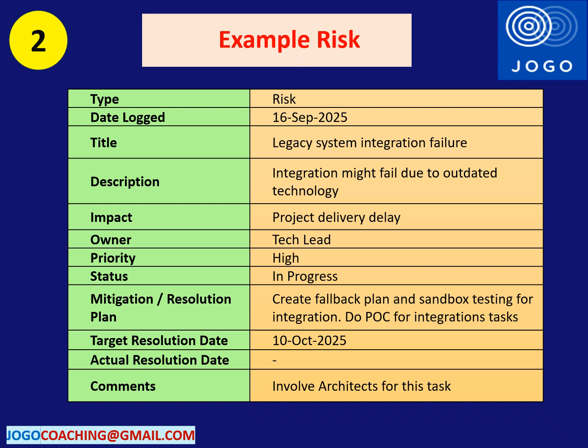The mitigation plan is to create a fallback plan, use a sandbox for integration testing, and also do a POC, proof of concept, for the integration task. For this risk, the team has already involved the architect to help with the mitigation.